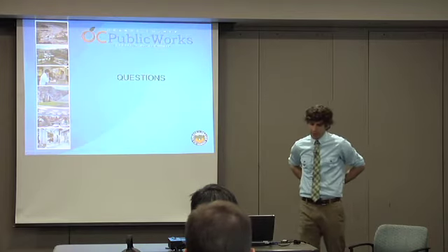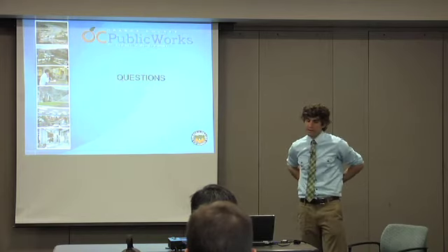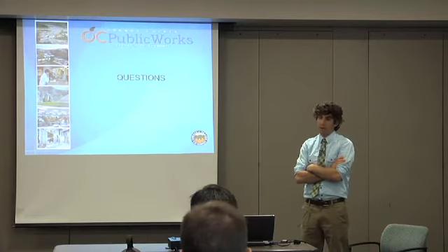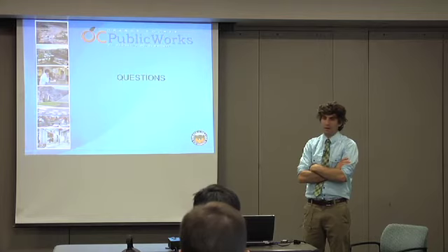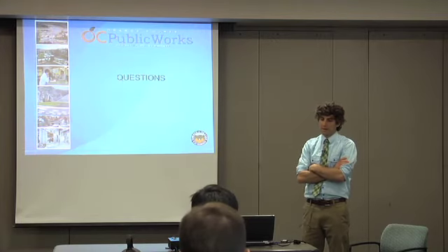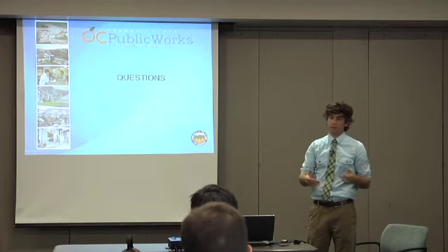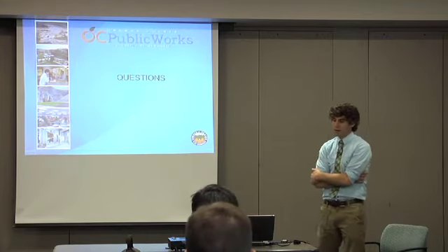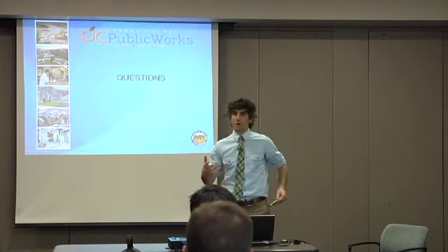One other lesson learned, and we've dealt with this in North Orange County, and I also see it in a lot of other cities that have gone further in LID, is that people are not doing a very good job with inlets and outlets from these systems. They're inherently landscape-based, integrated within the site, and the result is that they don't have big drop inlets that civil engineers are used to designing. They have little curb cuts. They have maybe some riprap that brings the water from the curb line down to the bottom of the system, and so a couple of inches here and there can really influence whether water gets into the system or not.